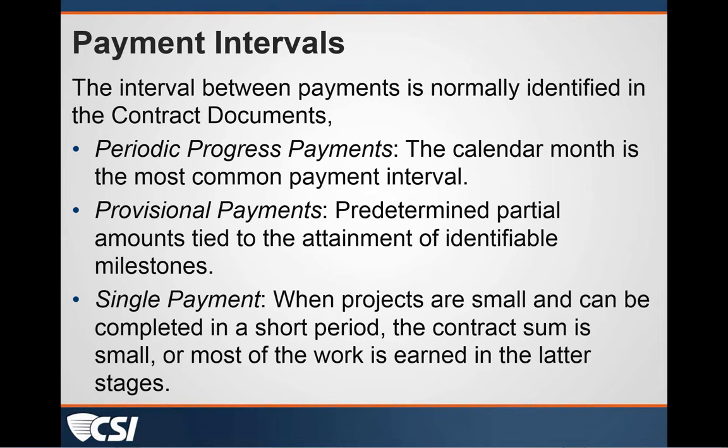Right, I was going to say, and I don't know if this is where we would cover that, but in some cases that we're experiencing on projects there's a required down payment, even with state-funded projects, for example, ordering the elevator or producing shop drawings for certain systems in the building, and they're becoming more prevalent in projects. This really is a down payment to production of, or creation of. And I guess those may be considered as provisional payments that may show up in your schedule as milestones that would get processed. Yeah, I have seen that, at least here in North Carolina, where the elevator manufacturers are looking for this down payment, even prior to submitting shop drawings.